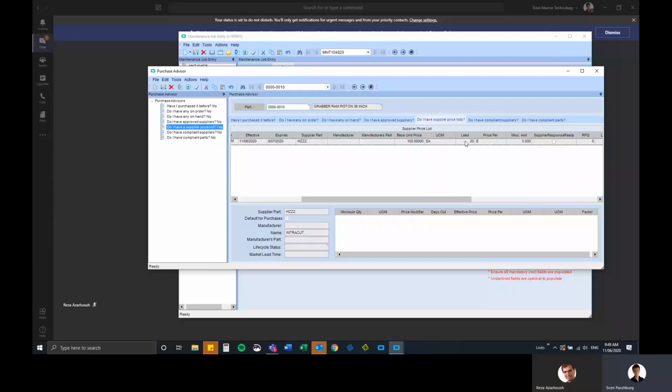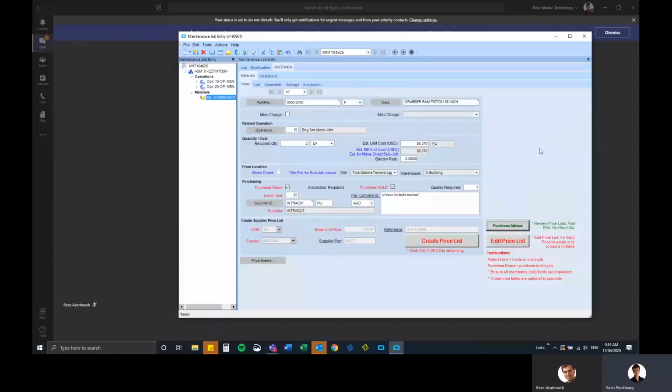and it has a lead time of 20 days, which I set. Right, so now the price list is set, and that's great. If, for example, you made a mistake and it should be $80, I don't want you to go and edit this number here and then click this again, because this actually adds in a new price list, and it adds in the new price list starting from when the other price list that's currently in there finishes, right? So that it just effectively won't change.